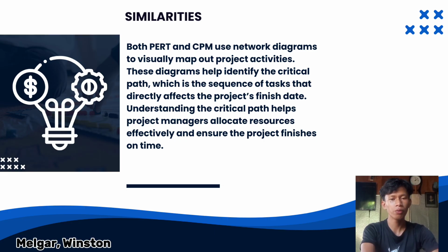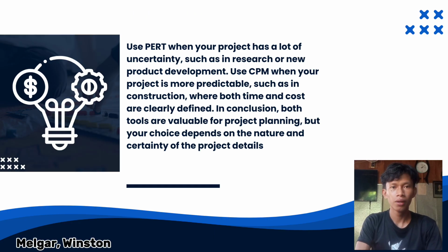Now, finally, when you should use each method. Use PERT when your project has a lot of uncertainty, such as in research or new product development. And use CPM when your project is more predictable, such as in construction, where both time and cost are clearly defined. In conclusion, both tools are valuable for project planning, but your choice depends on the nature and certainty of the project details. For example,